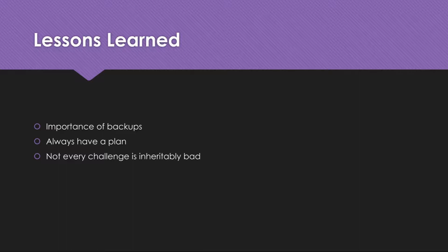The importance of backups. Since COVID-19 forced us out of our lab environment, we had to really rebuild our entire setup from scratch using VMs. If we had taken backups of most of our files, this process would have gone a lot faster and would have let us really work on the project. However, we had to spend a lot of time just rebuilding our systems.